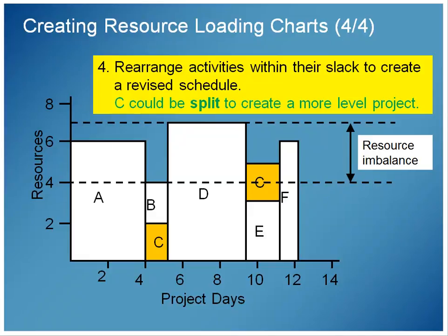Some things can't be split up this way. Right? You can't do something as if you're pouring concrete and it takes 2 days to pour the concrete for a certain activity. You might not be able to do day 1 and then come back 3 days later and do day 2. It might be inefficient in terms of getting the resources there, the manpower there, or whatever. But some projects can be broken up and split into a certain part of the project now and a later part of the project later, and that's called splitting.